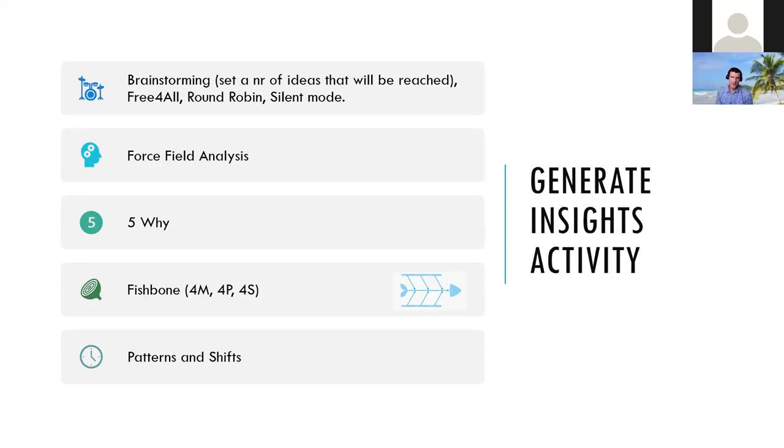And for the dependencies, a fishbone diagram, as you can see. Each bone has a different dimension. In the context of the 4Ms, that's method, machines, materials, manpower; the 4Ps: place, procedure, people, policies; and so on: surroundings, suppliers, system, skills, you name it. If you gather those facts into those dimensions, those areas, it's easier to pick up dependencies, and it organizes the whole ecosystem.